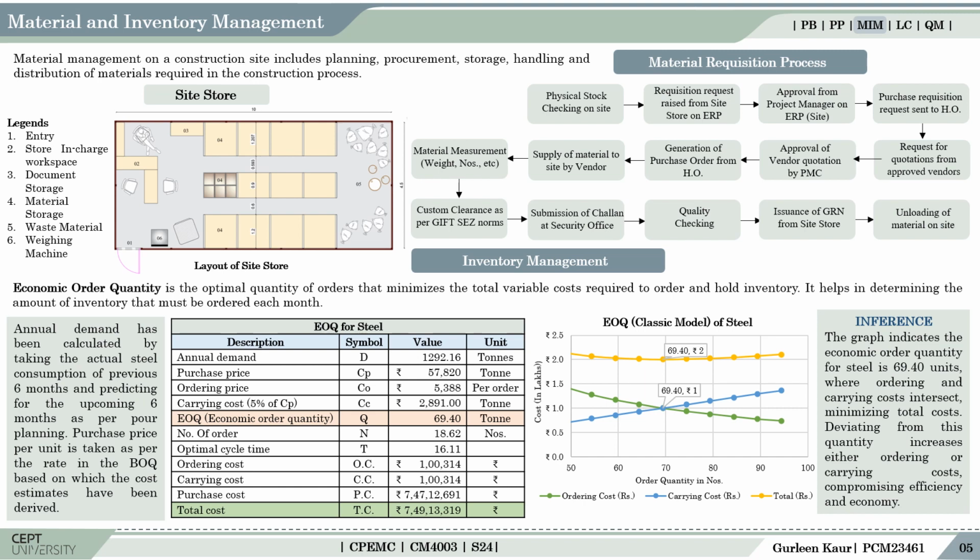It is measured and custom clearance certificate from the GIFT SEZ along with the challan is submitted at the site. After passing all the quality checks, the goods receipt note is issued from the site store and the unloading of material is done.